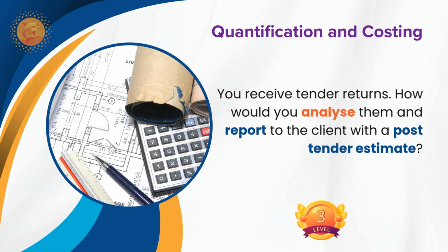Once we evaluate the technical submittal, we choose who achieved the best rate of submittal. After that, we go to the financial submittal, open it and check for errors in the tenders. There we will do tender normalization and compare it with the post-tender estimate.